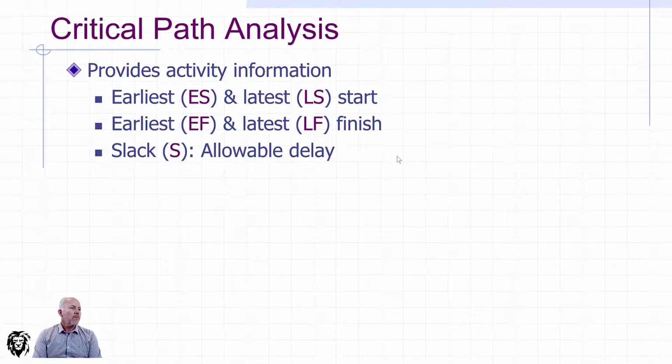And what we're going to do is use this process to identify the earliest and latest a project or an activity can start, as well as the earliest and the latest that it can finish, based on the precedence of the activities that lead into it and follow it. And whether or not there is any slack, which is maneuver room to purposely schedule that activity to the left or to the right without affecting the overall project length, which is one of the goals of why we're doing the CPM.